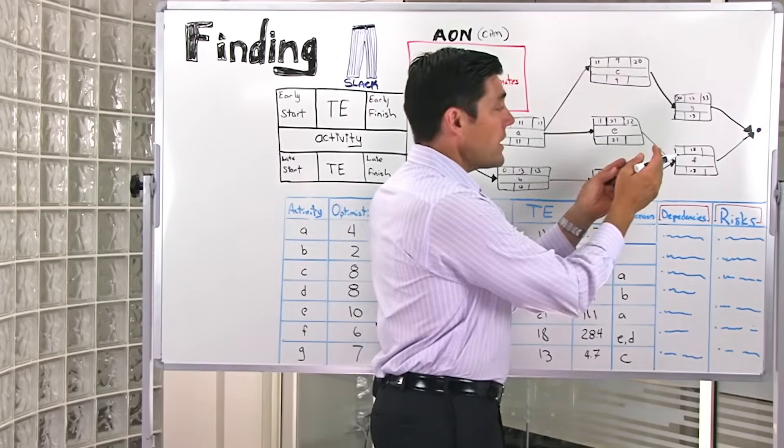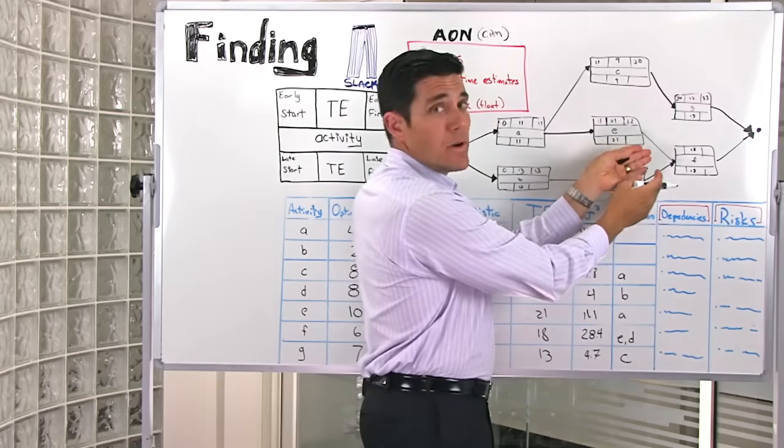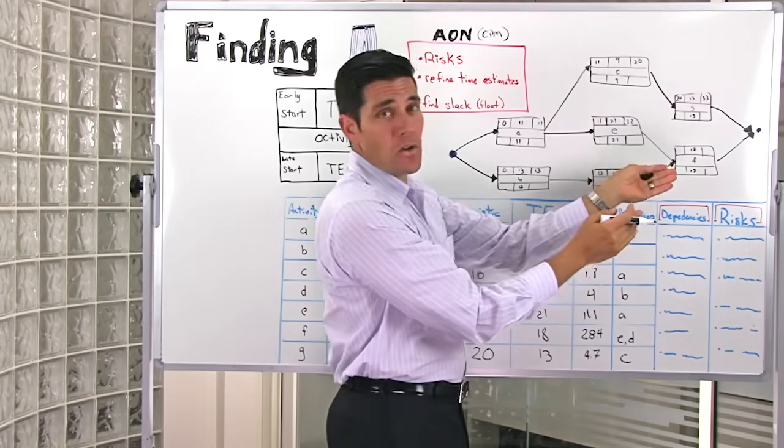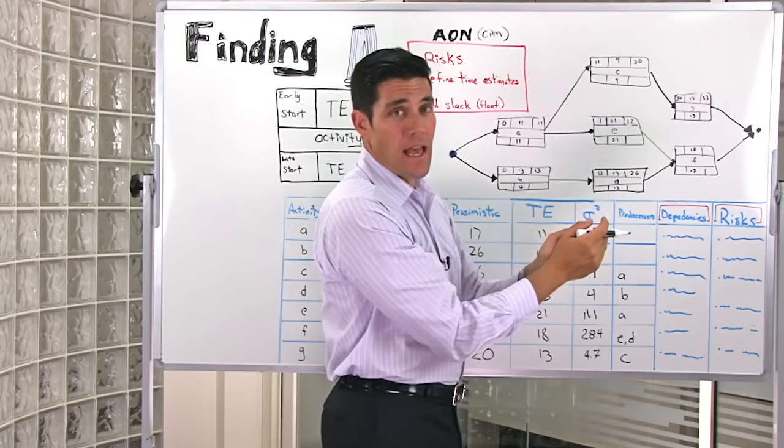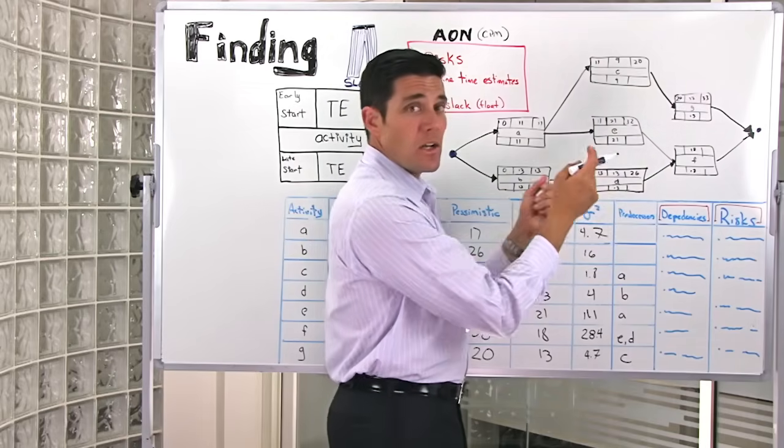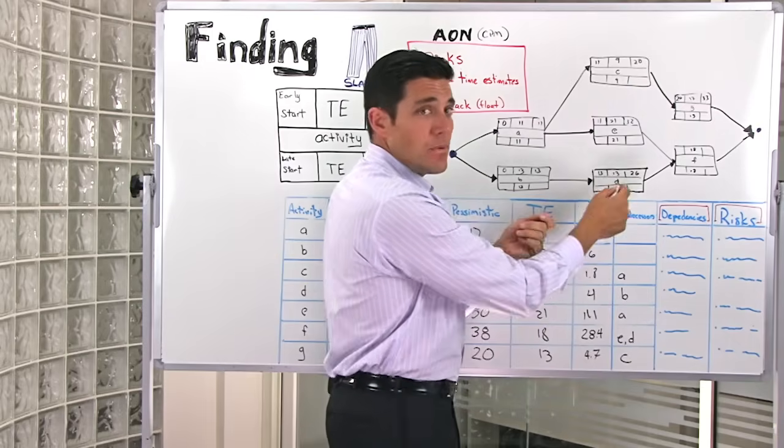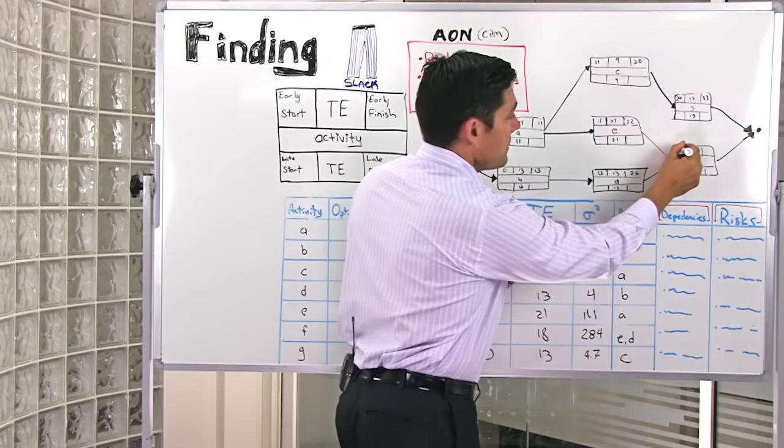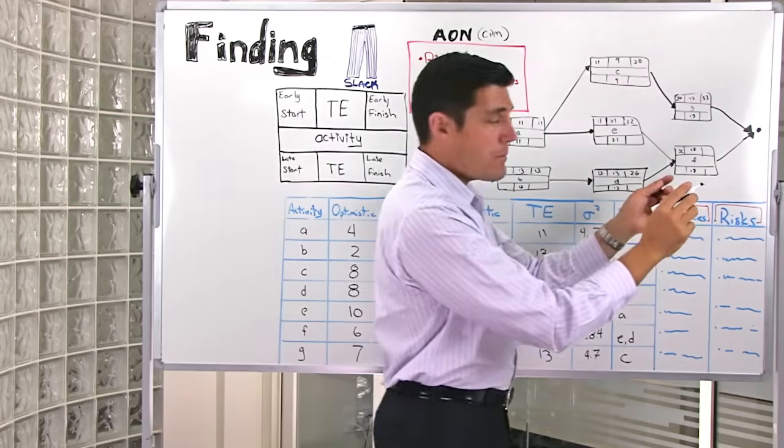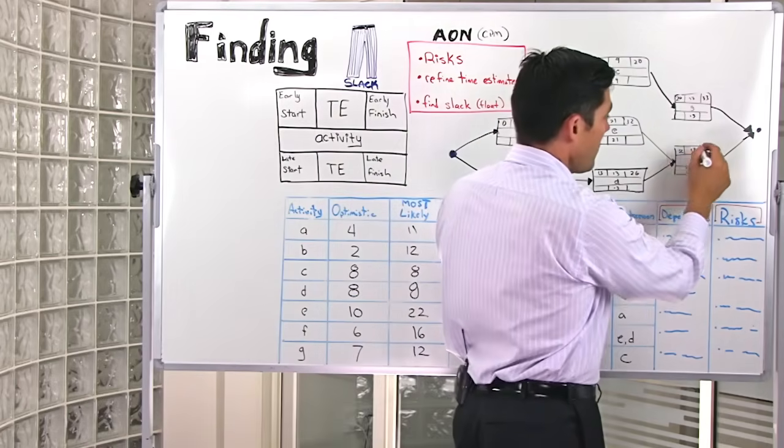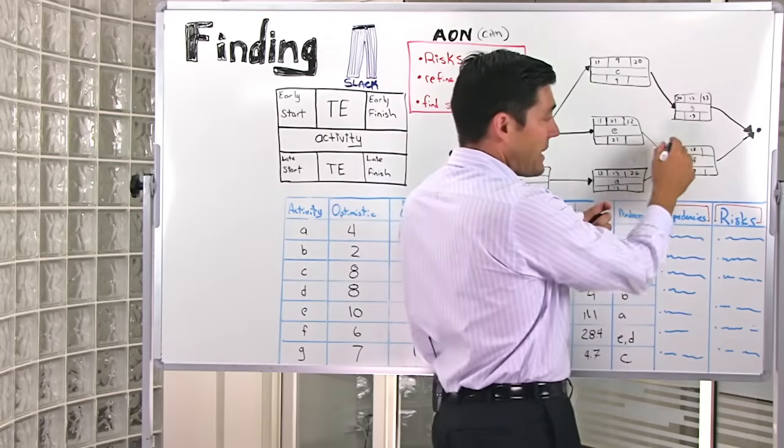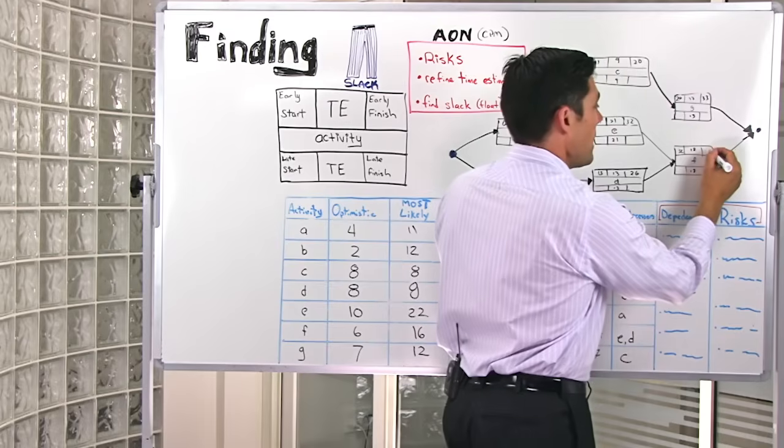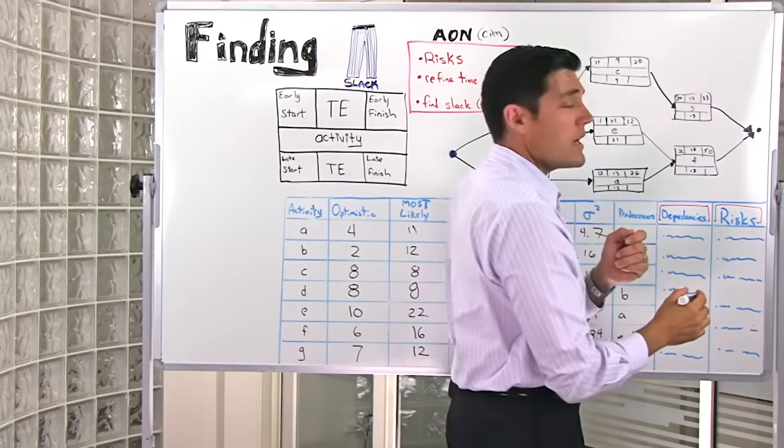Now I've got a problem with activity F, because I've got two predecessor tasks going into it. So how do I determine what is the earliest start for activity F? Quite simply, it's the largest of the numbers between its two predecessor activities, which in this case is going to be E with 32. Now I can finish my forward pass through the diagram, 32 and 18, because that's the expected time for task activity F. That's going to give me a total duration of 50.